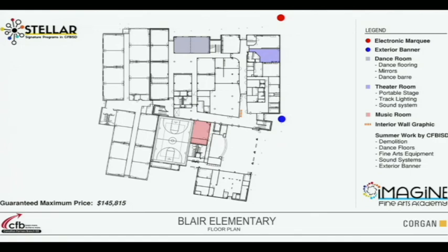Music. Thank you. Sorry. And then I would like you to note the summer work by CFBISD. That's an important component of these projects. In order to mitigate this delay in scheduling, we took on some of the projects in-house, and you can see how those are listed. Typically it took the form of demolitions, so we wanted to get all the dirty work out of the way before the kids got back in school. So those pieces of projects are ongoing. Also draw attention to the guaranteed maximum price, or the GMP, there for each project.